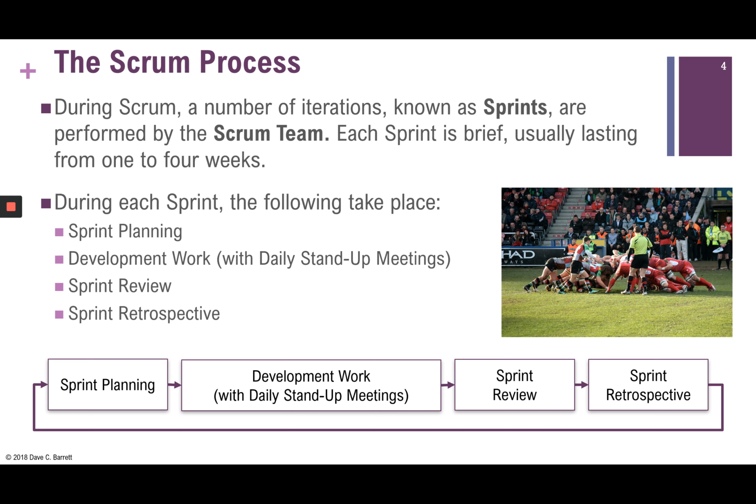Now, in terms of size, in a typical sprint, and again, there's no absolute one way to do so. But let's say that we are doing 1 week sprints in a project, and the case study project that is going to be followed using Scrum has a 1 week sprint. So in that instance, with a 1 week sprint, the sprint planning would typically be about half a day.